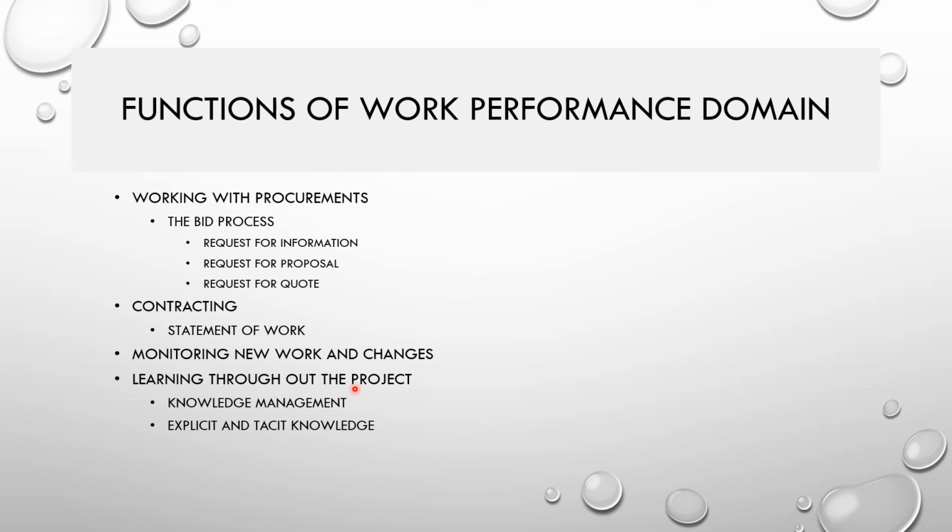You need to have a change control process in place, right? Any new change or new requirement comes in, they'll go to the change control board, do the impact analysis, analyze the new budget, analyze the new schedule, get the approval, go for additional funding, and re-baseline again. So that's how it's done.